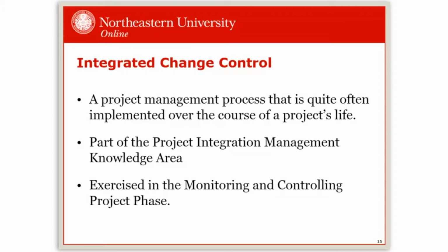The reason that we're mentioning it here is because as risks are realized, they may become issues and changes. You will sometimes need to make changes to the project, and when this occurs, we may be doing it through the integrated change control process. So the change needs to be understood as well as possible, along with its consequences, before it is implemented. To help ensure that the changes are properly implemented, that's why we use this change control process. Also, as change is integrated into the project, it may introduce additional risks. We want to look at that as well.